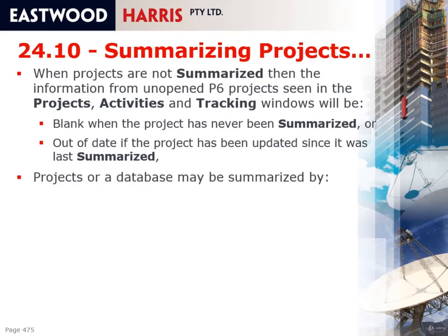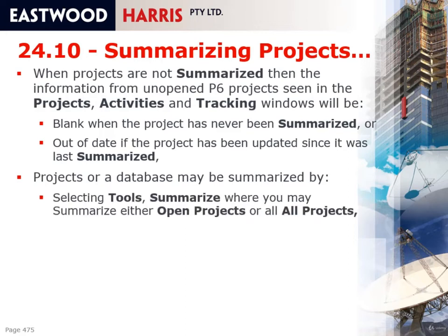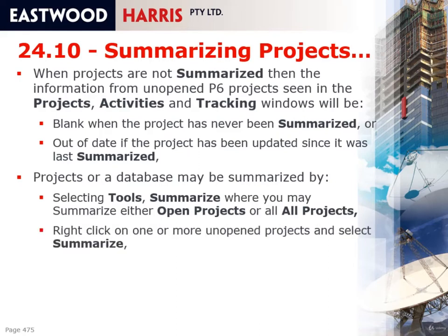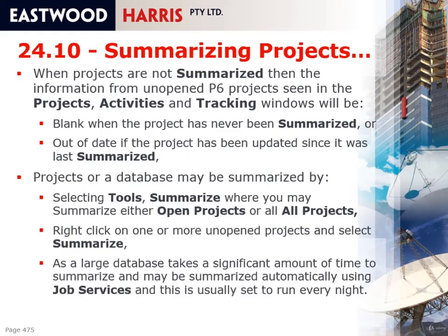Projects or a database may be summarized either by selecting Tools, Summarize, where you may summarize either open projects or all projects, or by right-clicking on one or more unopened projects and selecting Summarize. Or, as a large database takes a significant amount of time to summarize, they may be summarized automatically by using job services, and this is usually run every night.